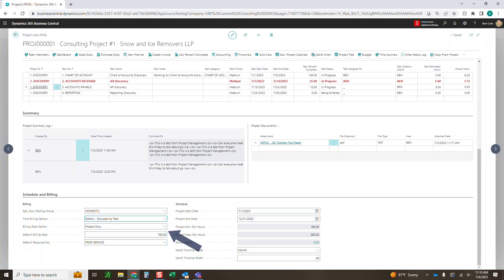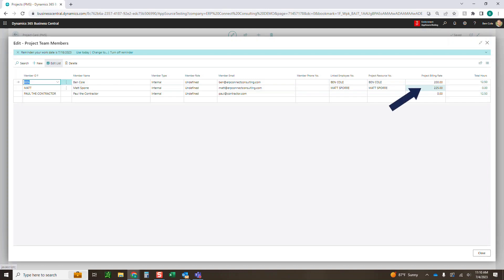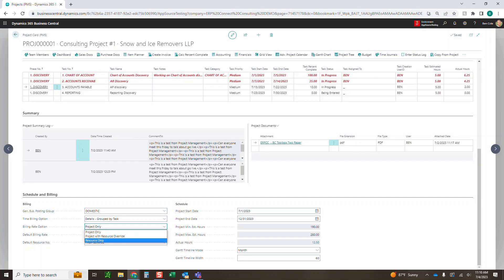Next are the billing rate options. Right now we've got Project Only, so everything bills at $195. The other options are Project with Resource Override and Resource Only. Resource Only pulls directly from the team members listed at the top — I've got a bill rate of $200, Matt has $225, and the contractor has $0. Project with Resource Override takes anybody who has a resource rate and uses that rate, and for anyone without one — like that contractor — it falls back to the $195 project rate. For today, we're just going to do Project Only, so everything gets billed at $195.